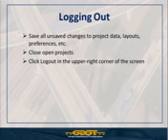Once the project goes live, currently, we make changes, but we have to have a way in program control to actually update to see the changes in the schedule, the management lead, and the baseline and that comparison. When we go live, since it's web-based, will it be automatic? I mean, when we put a date in there that updates 2 or 3 things, will we automatically see it? No, it's still going to be the same process as it is with Artemis now, where you'll go in and make all of your updates, and then the projects will be rescheduled at a single point in time all at once, and then you'll see those changes reflected after that.